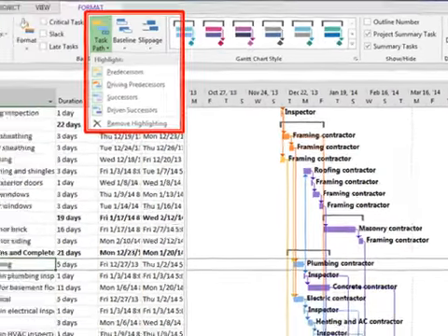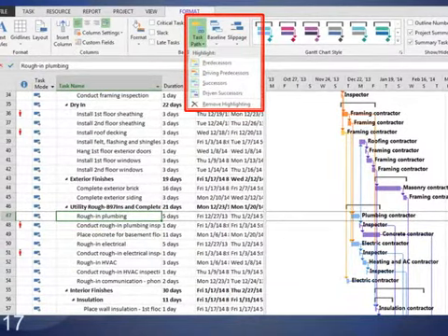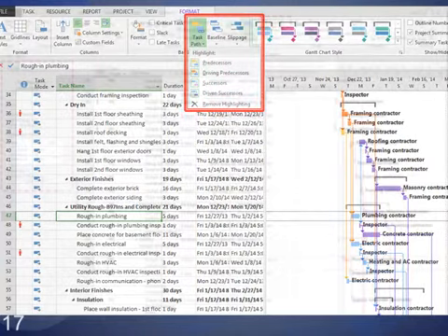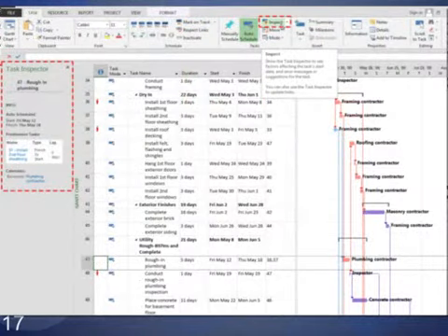And if you have the Critical Tasks checkbox turned on in the Format tab, that color, of course, will override the Task Path feature and the critical path will stay red. It's an easy matter to turn off the Critical checkbox, of course. And again, each layer can be added or removed as needed, and the color changes based on which task is active. A lot of visual information, but a nice add, and it also is a nice add to the Task Inspector feature. If you've never used that, you should definitely go on the Task tab and turn on the Task Inspector while messing with the Task Path feature.